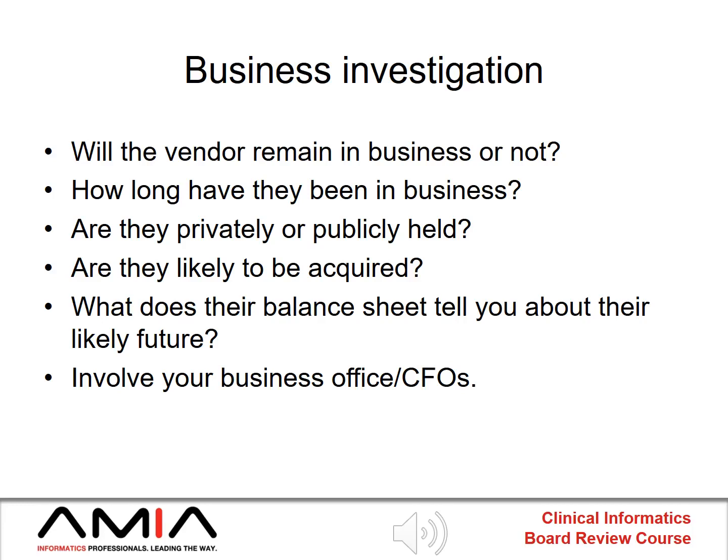So questions such as how long they've been in business, whether they are privately or publicly held. Are they going to be acquired? If they can be acquired, you never know about the future of that product line by the organization that's acquiring them. You may want to look at their balance sheet to help understand their likely future. And if you aren't facile with investigating balance sheets, you may want to involve someone in your organization who is, such as your CFO or someone in the CFO's office.